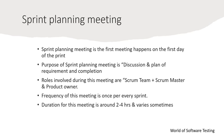The sprint planning meeting is the first meeting and happens on the first day of the sprint. During this meeting, the team commits to and picks requirements for the upcoming sprint. The sprint requirements and planning are frozen during the meeting — specifically the sprint goal, what product backlog items can be accomplished in the upcoming sprint, and how to achieve each item.